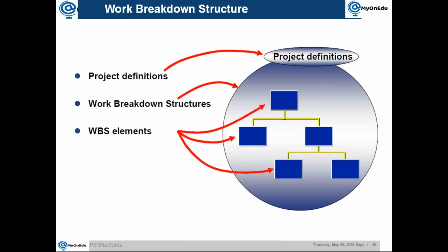It's only technically project controlling and controlling parameters. So the cost object is the WBS element. Normally the level 1 WBS represents the overall scope of the project, not the project definition. You need to understand that. So level 1 is the one which represents your overall scope. Then level 2 together considers your phase and methodology. Then the rest of the WBS, how you are going to make it.